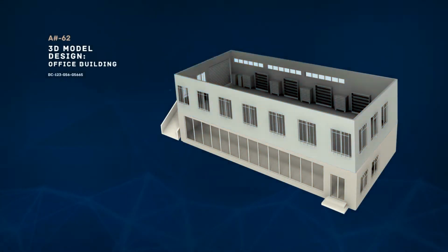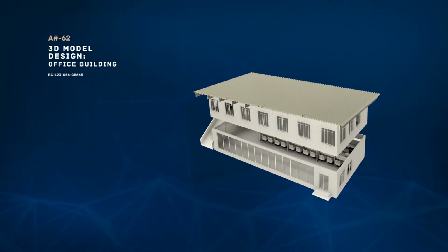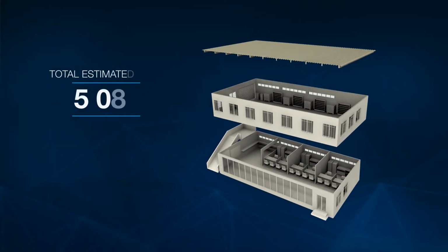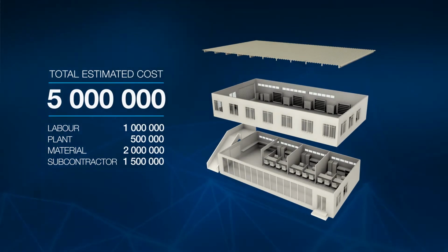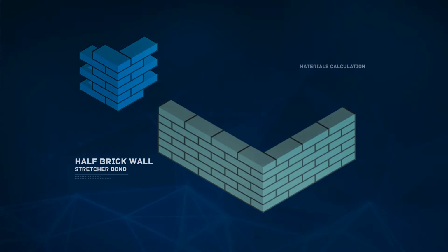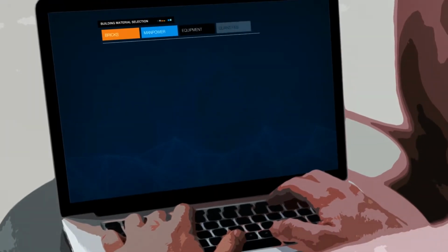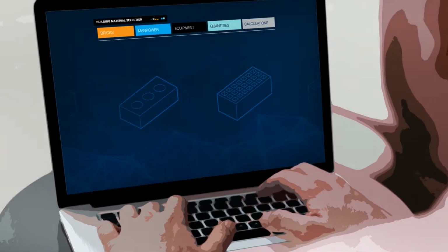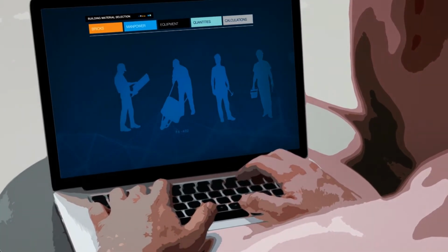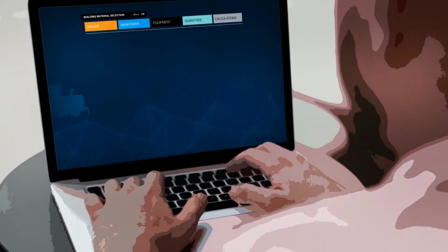By identifying and breaking projects down into their base components, first principles estimating provides estimators with an accurate understanding of the resourcing requirements and costs of a project. For example, when constructing a brick wall, a contractor using first principles estimating will first identify and price the basic resources needed to complete the job, from the type of mortar and bricks used to the workers and equipment.